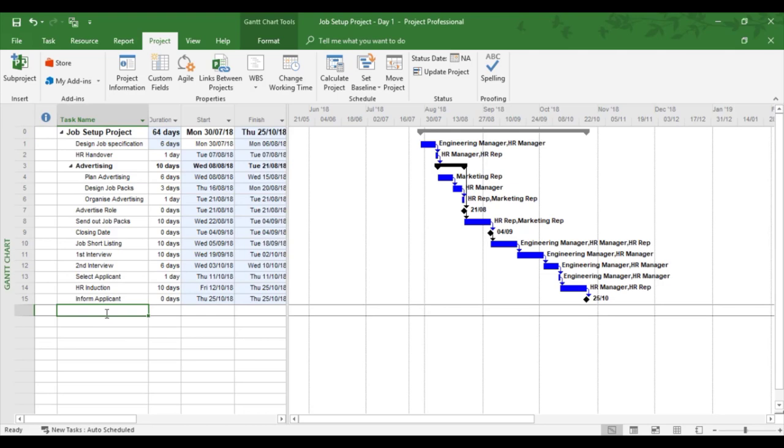So whenever you are affecting the resource calendar, you are going to affect duration within the project if you're going to put them on training courses. So this completes the training example of how resource calendars can affect a project. So when you are thinking of affecting a resource calendar, you know there is going to be an impact on the project. And also all the dates have gone blue, except one or two, and this shows the change and the effect of the resource calendar.